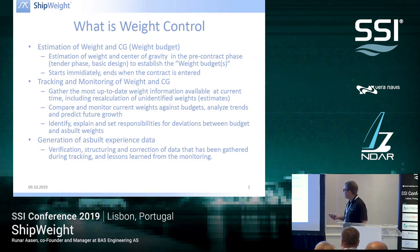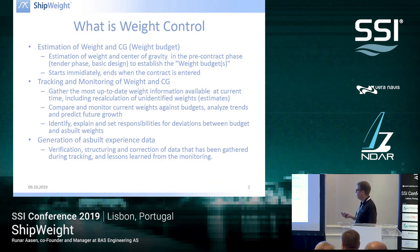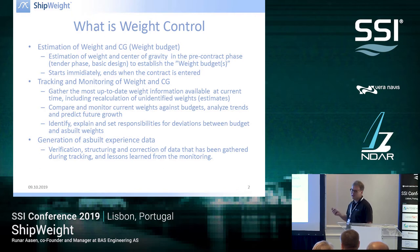So you compare and monitor current weights against budgets, analyze trends, and predict future growth in this phase. You also identify, explain, and set responsibilities for deviations between budgets and as-built weights.